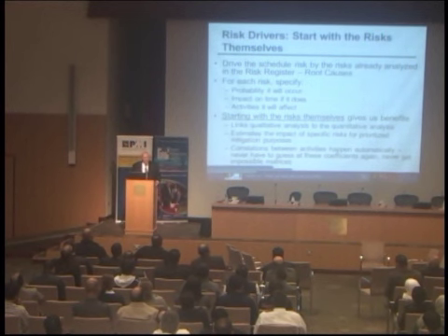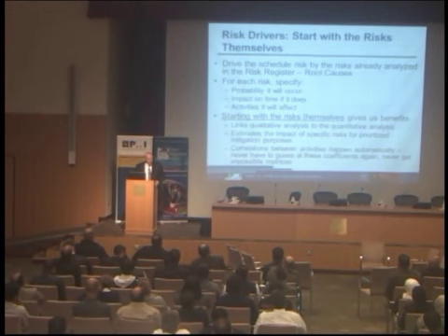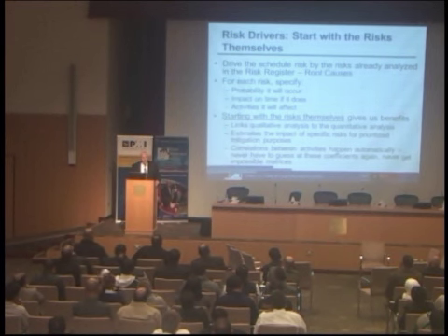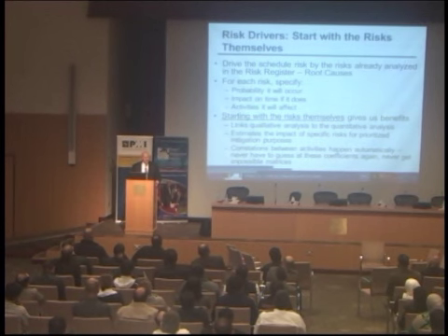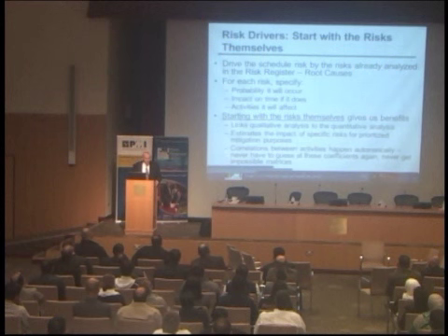Okay, what's the impact on time if it does? And here we're not talking about the impact on the overall finish date. We're talking about the impact on durations of the activities it affects. Well, it might affect long activities and short activities and all that, so we're going to use multiplicative terms. So if I say the worst case, if this risk occurs, is that the durations will be 30% higher, that's a 1.3 multiplicative factor. Maybe the best case is 0.95.